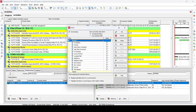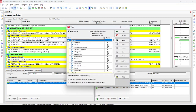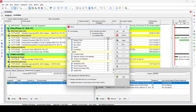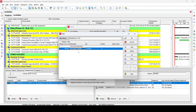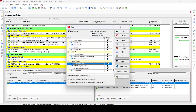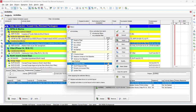Now let's look at the filter method. We go to the filter command and add or modify a filter. I already have a filter called 'Highlighting Lags'. We modify it so that Successor Detail contains 'd'. This means it will show all successor details containing the letter d, which represents the lag duration unit.